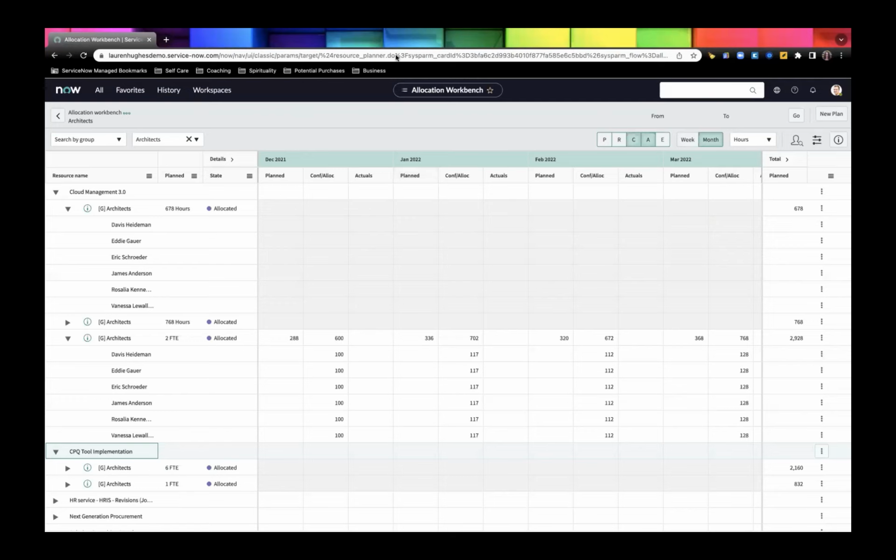cost plan, built. No, because some project managers want to keep the same planned costs because they already approved a budget or something, so they just want new costs from the new resource plans. So some customers don't want this automatic application. Some other project managers want to review the resource plans with the new costs for everything. So that's why it's by resource plan or by project.